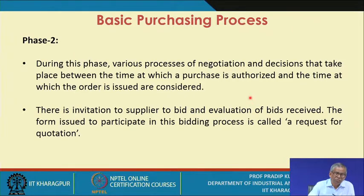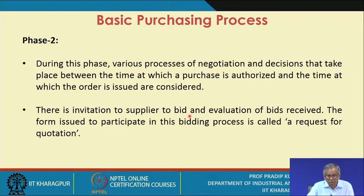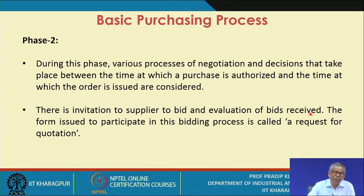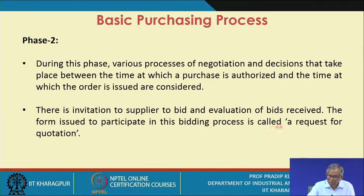As per the requests made, the purchase department prepares a purchase order. There is an invitation to suppliers to bid — this is referred to as the bidding process, a frequently used term in purchase departments. The possible sources of supply will be invited to bid for the order. An evaluation of bids received is necessary, as it is likely that bids will come from several suppliers. Ultimately you have to select just one supplier, so evaluation of bids is a must. The form issued to participate in the bidding process is called a request for quotation.